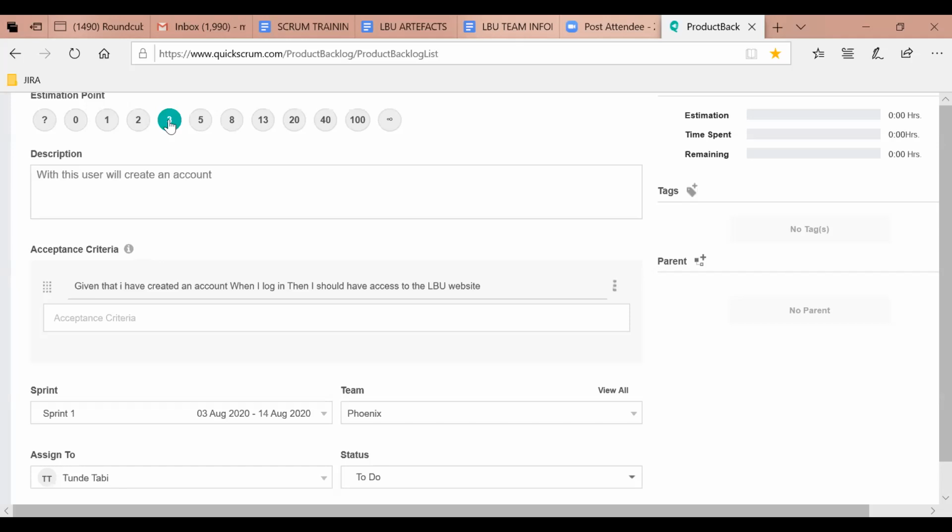So we are sizing these stories and we are having a conversation about the effort based on everything that needs to be done for that story. The tester is contributing, the developer is contributing, the user experience person is contributing. And based on that conversation, we come up with a size that we believe is reasonable as an effort for this story. So because we are in a learning environment, we don't need to exhaust our time arguing on any number. That's my point. I hope that makes sense.